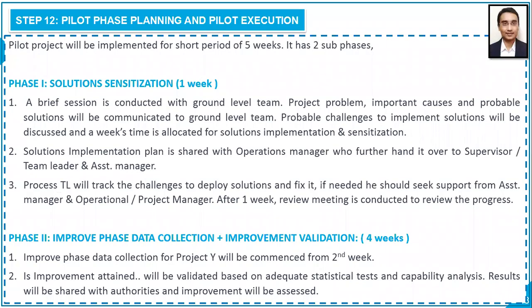But prior to that, of course, pilot phase planning and pilot execution. The pilot project will be implemented for a short period of 5 weeks. It has two sub phases. Phase one, solutions sensitization for 1 week. A brief session is conducted with the ground level team because they are supposed to implement it for a short period of time. The project problem, important causes, and probable solutions will be communicated to the ground level team. Probable challenges to implement solutions will be discussed, and a week's time is allocated for solutions implementation and sensitization.